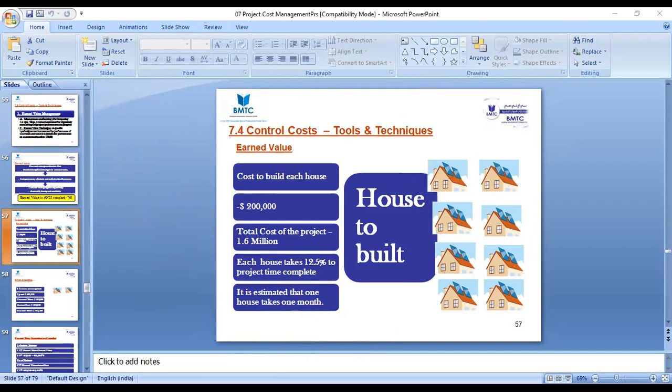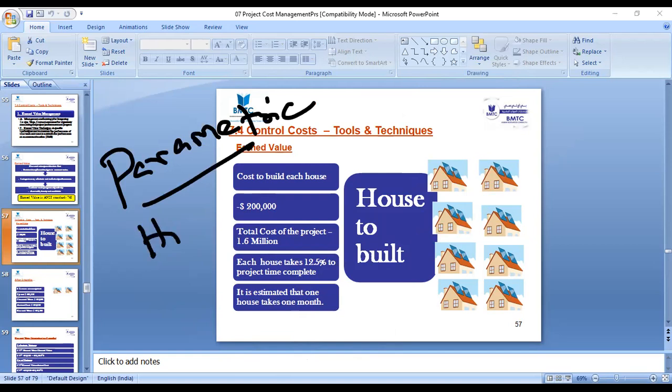Still, if you want to improve your estimation during the cost estimation, you can move to parametric. So parametric will be using what? It will be using the historical records. On what basis will you be using the historical records? The historical record should be an underpinning data. It should have concrete information. It should be solid, concise, and precise. And it should have timeliness. It should have relevancy.